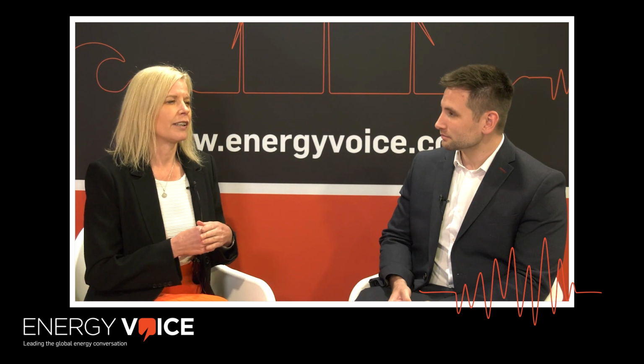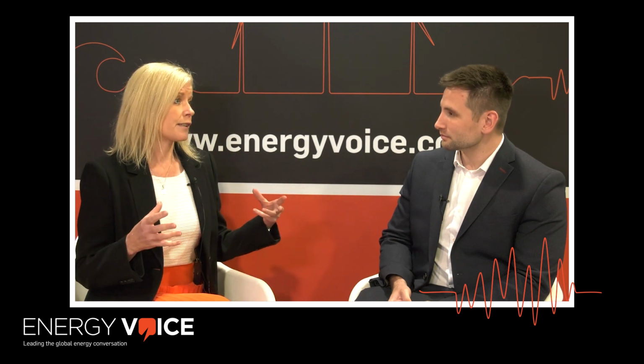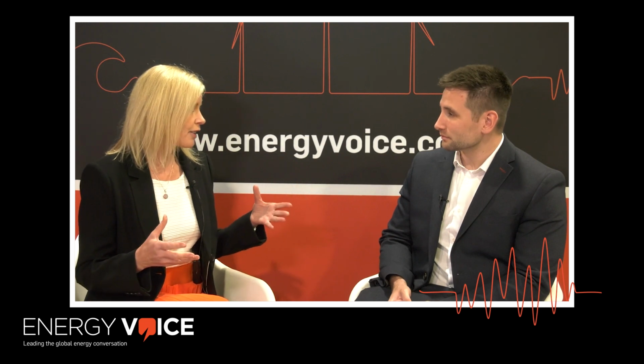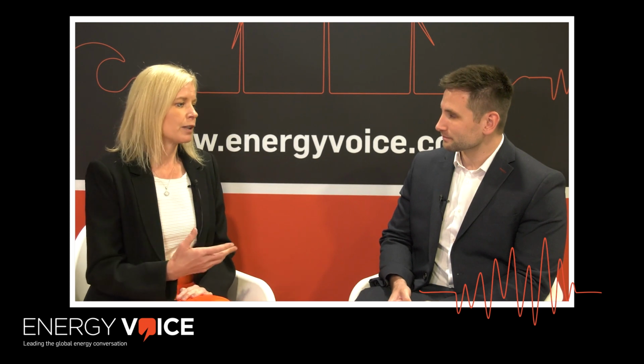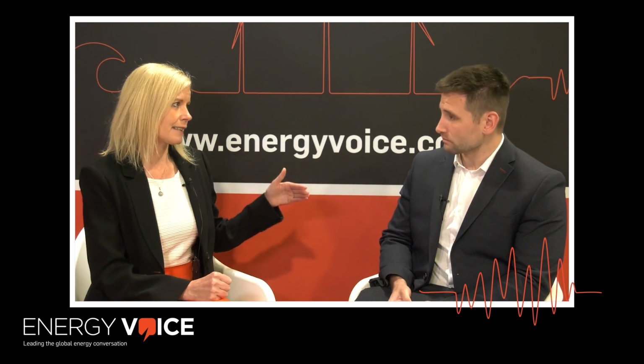So I think the fact that hydrogen has been recognised as an energy that can be stored matters. And what I see in the UK manufacturing market is that there is UK manufacturing, but clearly not sufficient for all the massive projects around oil and gas, hydrogen and carbon capture. When you look at hydrogen storage in particular, there's a lot of manufacturing in Europe and a lot in Scandinavia. They're very expensive, that's what I'm hearing from the market. Hydrogen storage is very expensive and also has a very long lead time. It could take up to 18 months to get vessels, or a bank of vessels, manufactured.